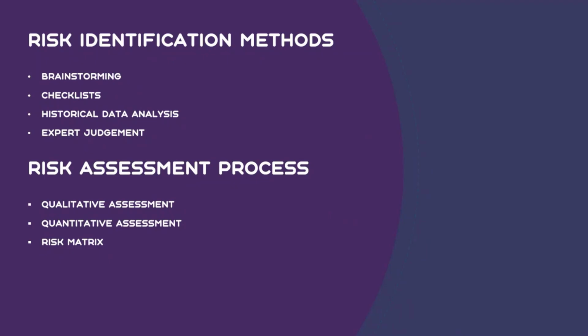Second factor, severity of the risk. Imagine what will happen if the cost goes over the budget. It's a big impact, because maybe that will impact your profit also. So that's really critical for me. I will put 9 or maybe 10, or I will put 8 also. Then 9 into 10, or 10 into 10, 100 is my score for that.